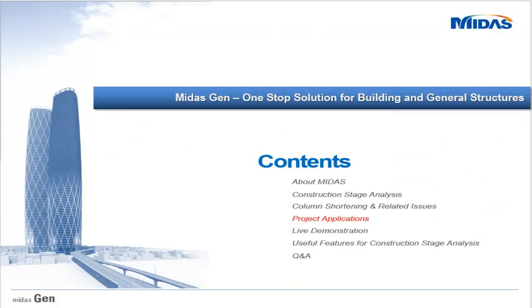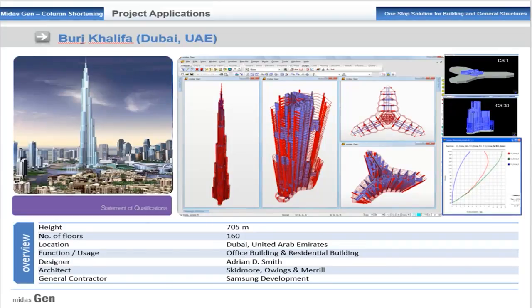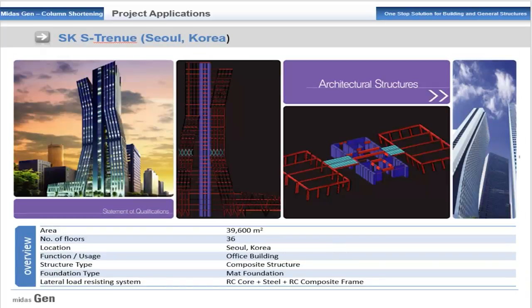Let us look at project applications of Midas Gen that have used column shortening analysis. The Burj Khalifa, 705 meters height, 160 floors, located in Dubai, was analyzed in Midas Gen by general contractor Samsung Development. In order to account for time-dependent concrete effects, a comprehensive construction sequence considering creep and shrinkage effects was used. Another application is the SKS channel in South Korea, with 36 floors all having different shapes — a composite structure with a reinforced concrete core, steel installations, and RC composite frames.